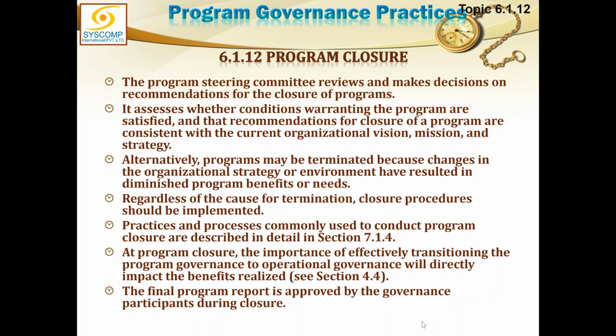Regardless of the cause for termination, closure procedures should be implemented. So wherever in the life of the program you are, if you are told that the program has to be terminated now, you will start the closure process. You will transition all the benefits achieved so far to, naturally, the beneficiaries, and ultimately you will do the sustainment of those benefits. A sustainment plan will be created for that.